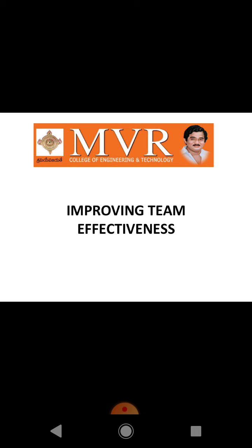Barry Boehm's five strategic principles are: the principle of top talent, use better and fewer people. The principle of job matching, fit the task to the skills and motivation of the people available. The principle of career progression, an organization does best in the long run by helping its people to self-actualize.